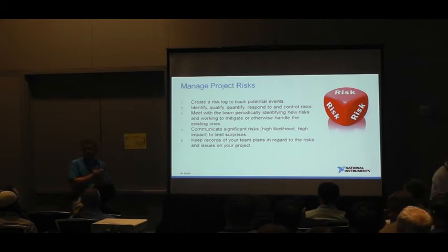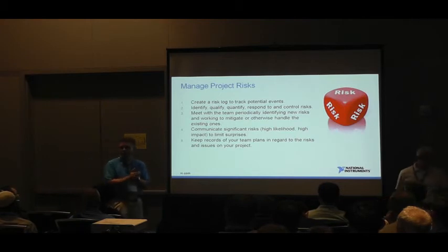And I hate to say it, but sometimes risk does impact price. The more risk I have to assume, if I think this could take me 20 hours or it could take me 200 hours, and it's fixed price, you're going to have to mitigate that risk somehow.